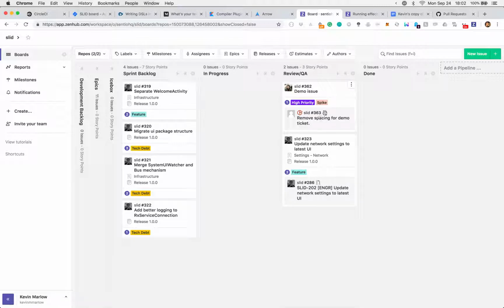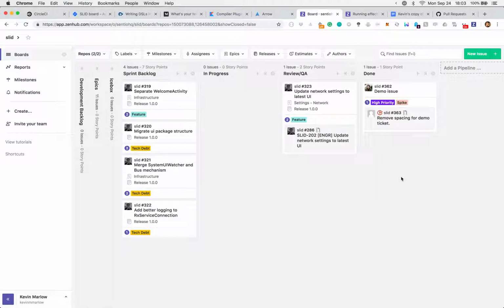It's worth noting that right now, just closing a PR doesn't move the ticket automatically. This is because by ZenHub's default style, issues can have multiple PRs. So what that means is that whoever does the merging, probably me, will be responsible for saying, hey, does that PR solve all of the problems for this ticket? If so, I'm going to go ahead and drag this to done. I get a lot of notifications as well. Sorry for the noise. So basically when it's done, we're going to leave it as done.